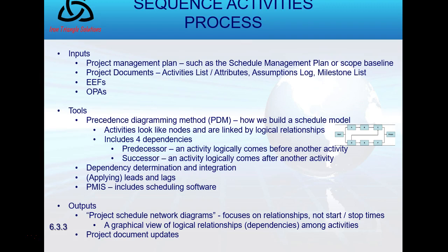And we have our outputs. So in sequence activities, I produce a schedule network diagram. This is an order that focuses on relationships. There are no times here yet. It just focuses on relationships. And of course, project document updates.